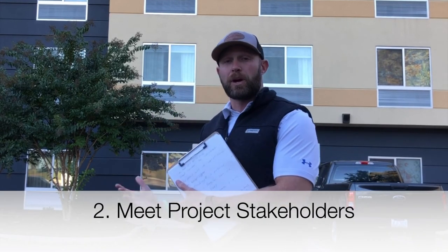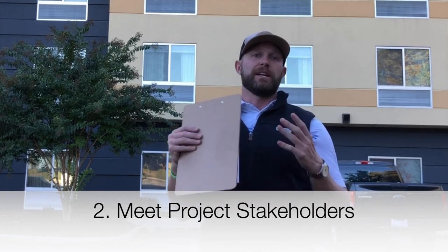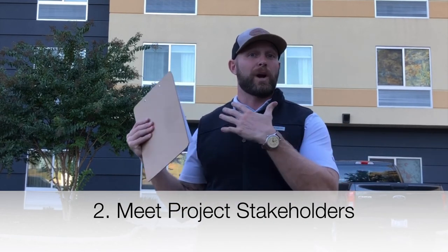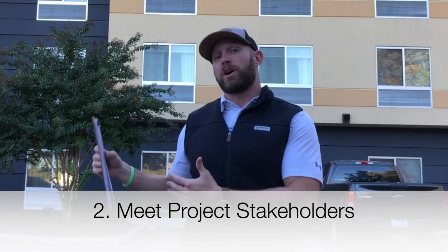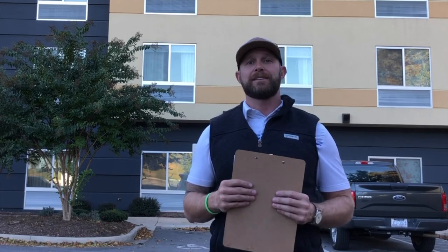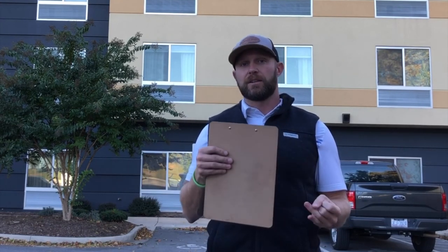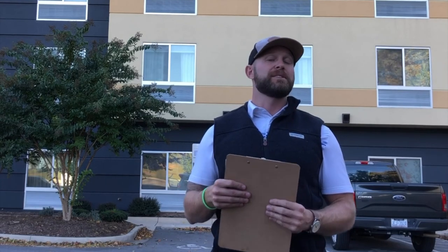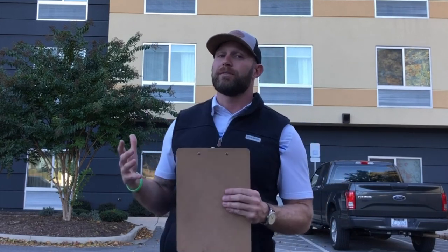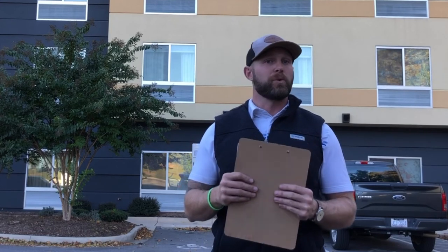For this particular project, this is for the Department of Veterans Affairs, so we'll get to meet the Department of Veterans Affairs people that we're actually going to be working with on this project. And you can ask a lot of questions that you typically won't be able to ask otherwise, especially if you're bidding on any kind of state, local, or federal government jobs, that you may not be able to ask in an RFI, or request for information, but that you can ask in person. So being able to meet the stakeholders and ask those extra questions is a hugely important part.